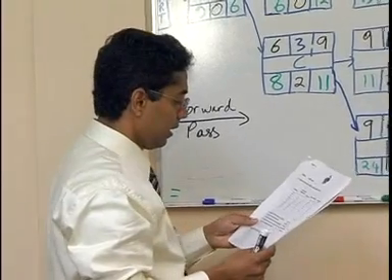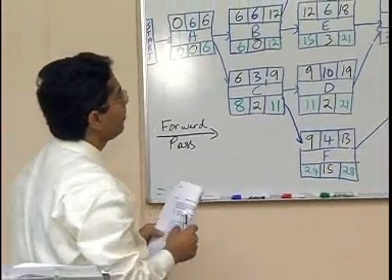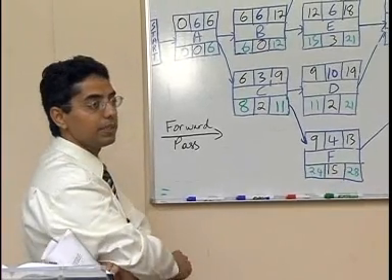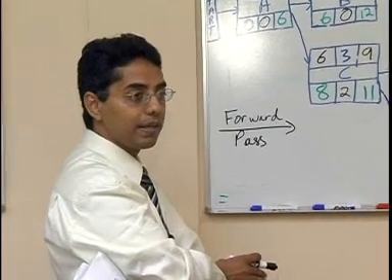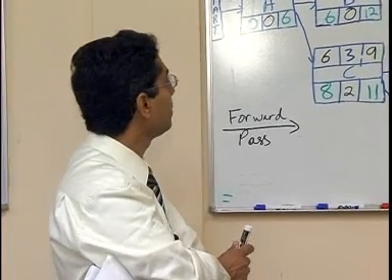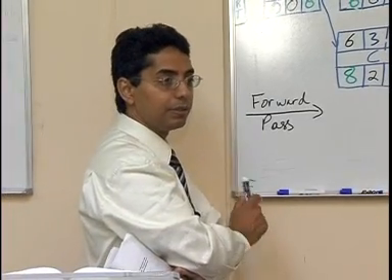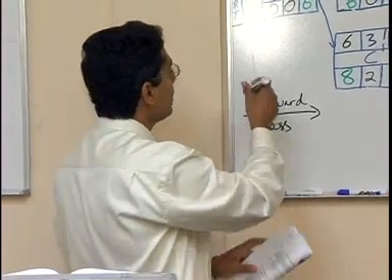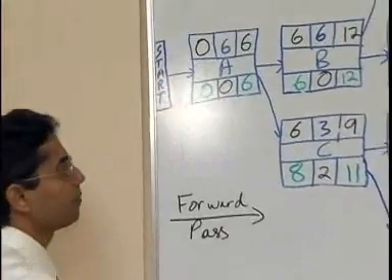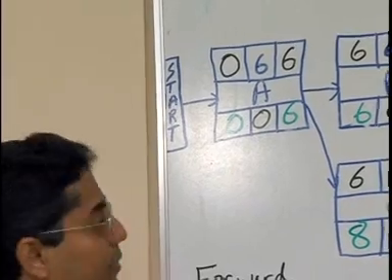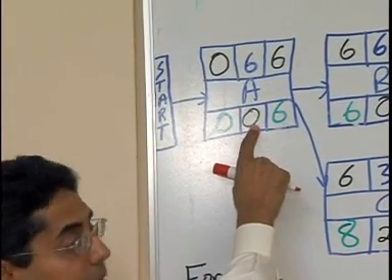Now, it says, what are the critical path activities? Critical path activities are those activities which have a slack of 0. That means no slack. But how you have to work it out is, you have to map the path from start to end. So in this case, we're going to map the path. Now we start from start. Which activity has 0 slack from start? There's only one activity coming out and it has a 0 slack, which is A.